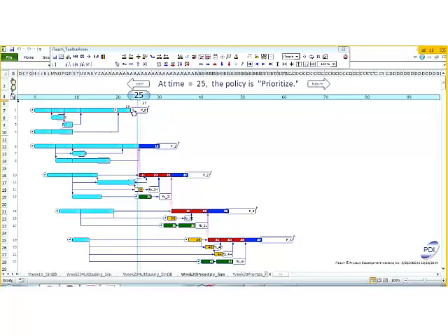Let's update this and take a look at how we're doing now. Schedule-wise, project 0 is finished. We're getting that revenue for a few weeks now. Project 1, we've had some incursion in the buffer of a few days. This is due to that handoff delay when a task finishes and we can't apply the output. But we've got a buffer to absorb that variation. And project 2, again, just a little bit of buffer incursion here. And project 3 isn't into work yet.